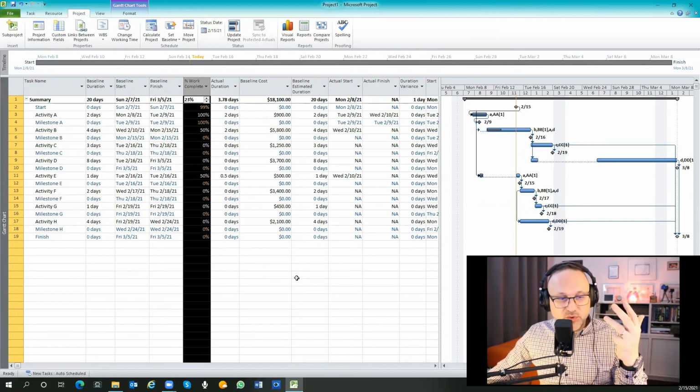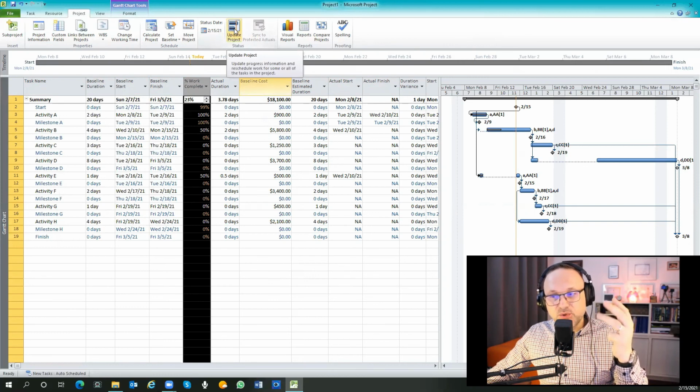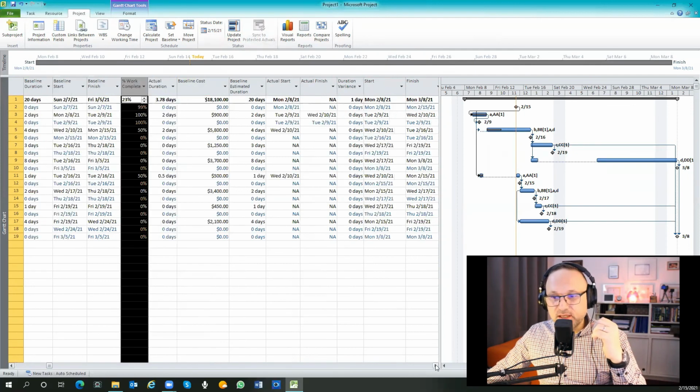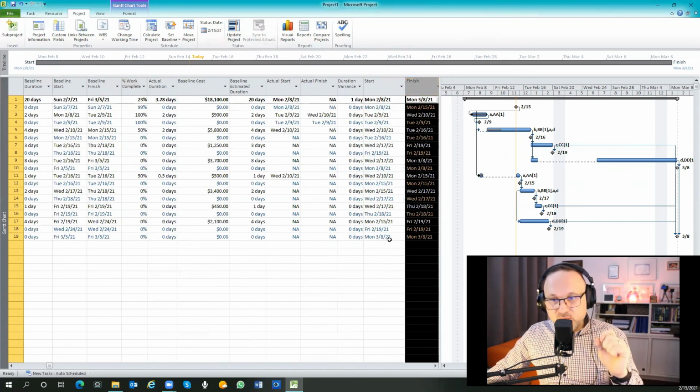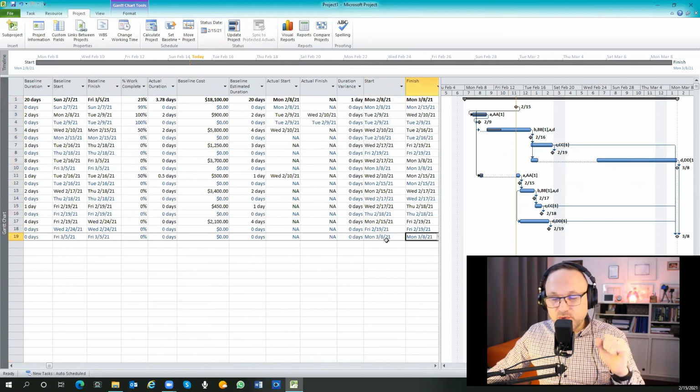Then you need to put the overall project schedule updates, and you reschedule the tasks which are not started to start after the current date. Then you will see your forecasts. And once you see your forecast, the 6th part, you need to analyze the results and take the proper project management actions to get back to your schedule and always be on schedule or ahead of schedule.